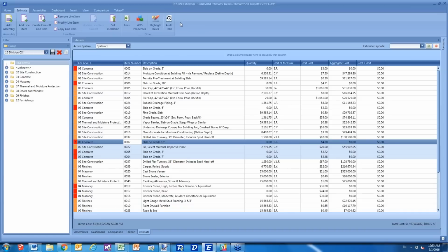You can also use escalation. So I can select items and specifically escalate or de-escalate values. So I might want to say that the material cost has a 20% escalation for waste, and apply that as well. And then of course you have crews and crew rates. If you do self-perform work and you want to work that in as an additional resource on your material or labor, you can do that too.